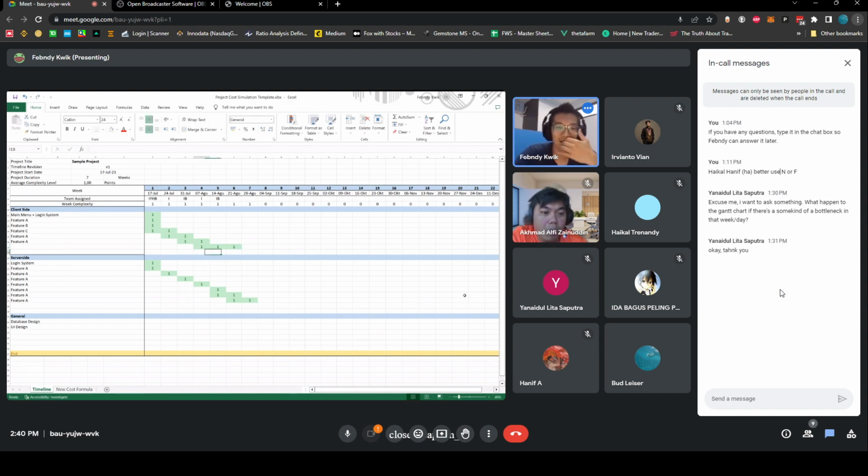In this case, if you take a look at this, I'm putting four items in 1 week, but this four, there's also this one. So we're going to be doing 6 things in 1 week, which is very difficult for a two-person team unless they know what they're doing. It depends on what kind of items. If it's simple items, if you break down, but in my case, remember that I only do modules here. So this means in 1 week I have to finish 4 modules. That's crazy. If I don't place 2 seniors on that week, it's almost impossible to finish.